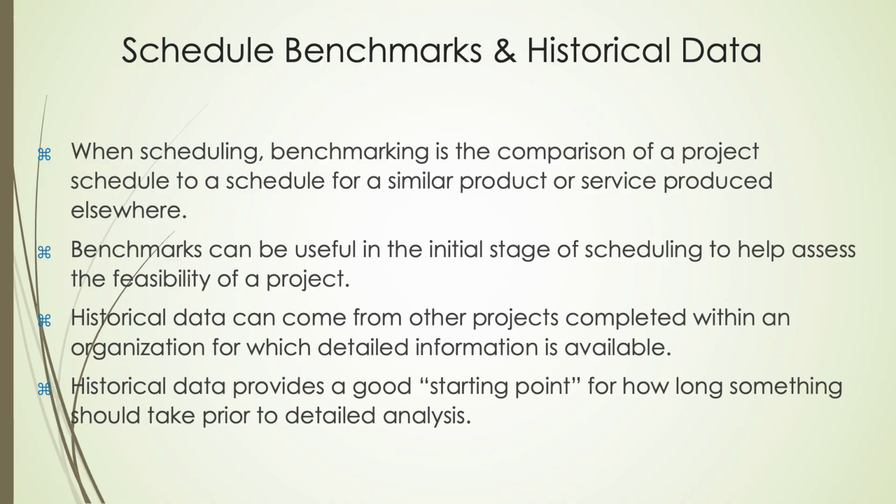Benchmarking in scheduling involves comparing a project's timeline to those of similar projects or products. It's especially helpful during the early stages of planning to assess whether the proposed schedule is realistic and achievable. Using historical data from past projects provides a strong starting point for estimating task durations before detailed analysis is done. This helps set expectations and guides more accurate, informed scheduling decisions.